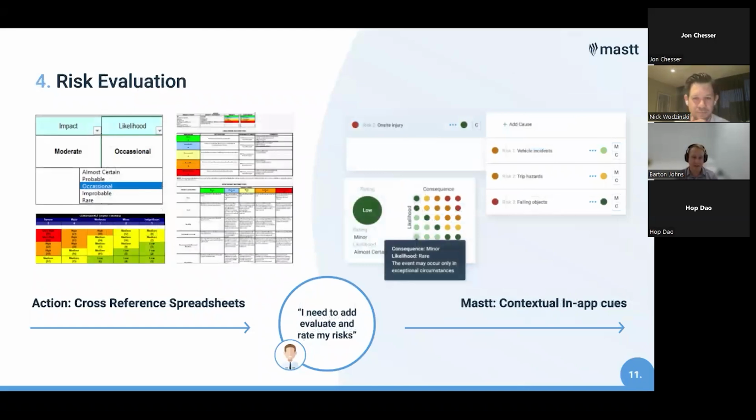Spreadsheets, if you're reusing templates across projects, can draw from tables on other hidden sheets sometimes, and all you need to do is add a row incorrectly, or add a column into your risk register, and it might not be pulling the right data, and all of a sudden your risk ratings are all out, and you've got post-mitigation risk ratings which are higher than your pre-mitigation ones, and it makes you look like a real noob. It doesn't reflect well on your business or you as a project manager.